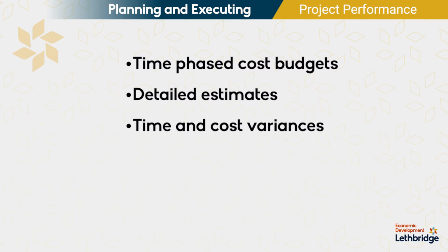So we want to look at a few different things here. And there is going to be a cheat sheet of formulas sent out as part of this session as well, but I'll briefly go over some of these at this point. One thing we want to look at is planned value. Planned value is what the budget would be at that time. So if I'm 6 months into a 12-month project, and the overall baseline budget of the project is $100,000, then I'm going to say that my planned value, or my PV, is $50,000. So that's planned value. It's based on time.